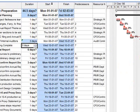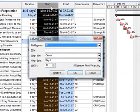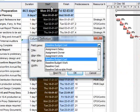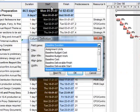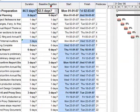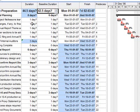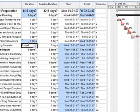For example, I will insert baseline duration. So I have original plan duration and I have current duration. So one was originally planned and saved as a baseline, and three is actual or the current duration.